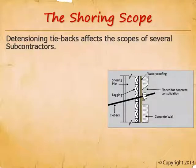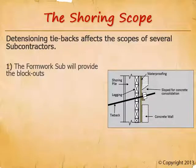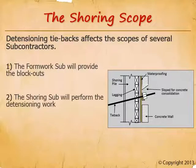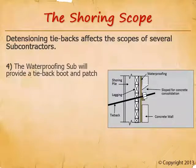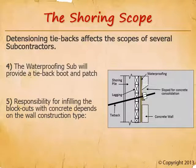Bidders do what they can to keep their bids as low as possible, so they absolutely will not include anything they don't have to or anything they don't think their competitors are providing. Blockouts in the foundation wall are required for access to the tieback heads so they can be detensioned once the building can support itself. The formwork subcontractor will construct the blockouts. The detensioning and cutting off of the ends will be by the shoring subcontractor. Tiebacks and their blockouts interrupt the wall steel, so we need to compensate by adding additional rebar trim steel around the openings — provided by the rebar sub.